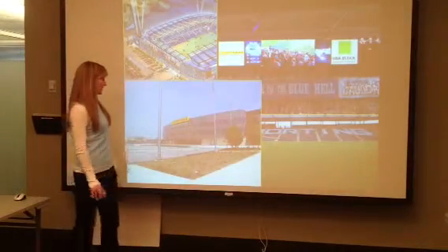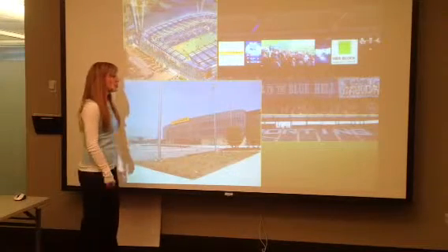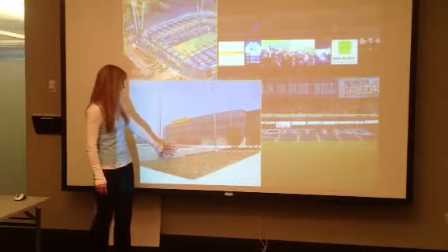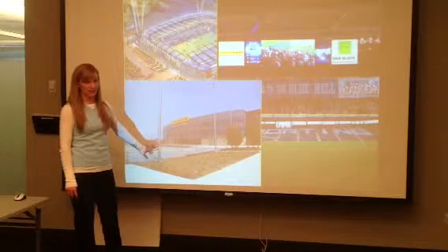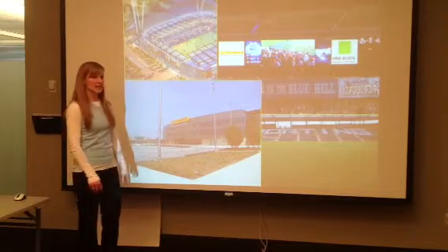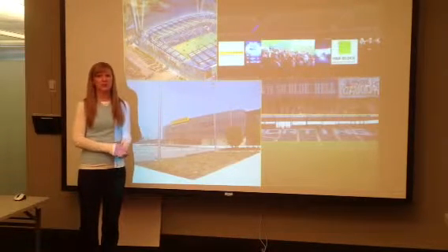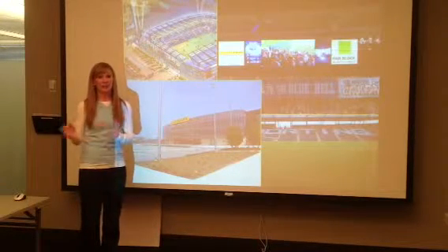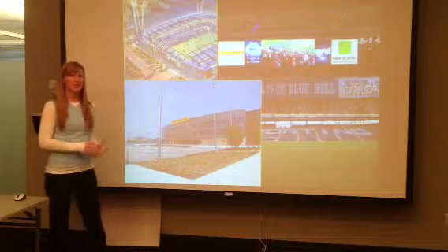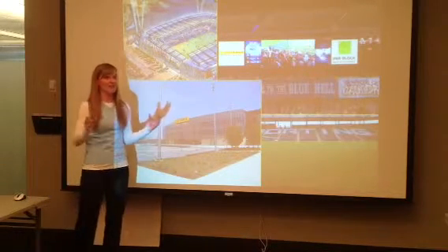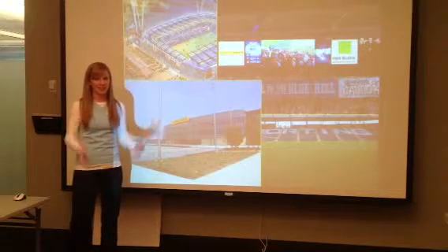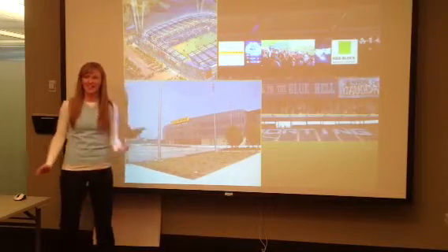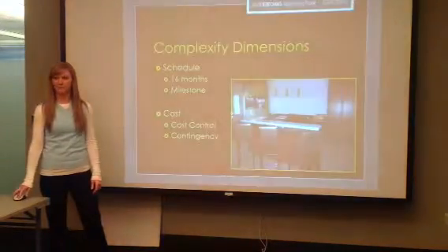Lastly, I just wanted to touch on the exterior of the stadium. Reason being is because what you see here is only a portion of the exterior work that we had to do as far as site work. We didn't receive drawings for that until 1.5 months prior to that June 9th soccer game. So just imagine getting your drawings, having to vet it out, bid it out, getting everybody on board, and put the work in place. Kind of a big task at hand.